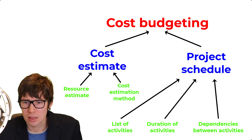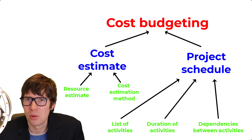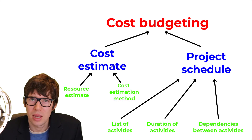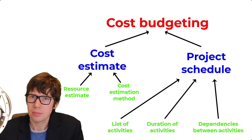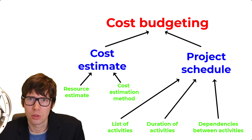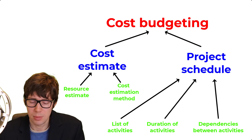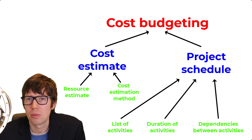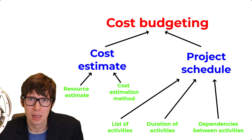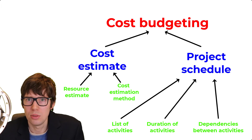To do cost budgeting, you need two things: the cost estimate (which requires the list of resources and quantities), and additionally, the project schedule. You can create a schedule using a network diagram or a Gantt chart. To make a network diagram, you need three inputs: a list of activities (usually identified through the Work Breakdown Structure), an estimation of the duration of each activity, and the logical relationships between activities — are they dependent or independent? If dependent, what kind: start-to-start, finish-to-finish, start-to-finish, or finish-to-start?